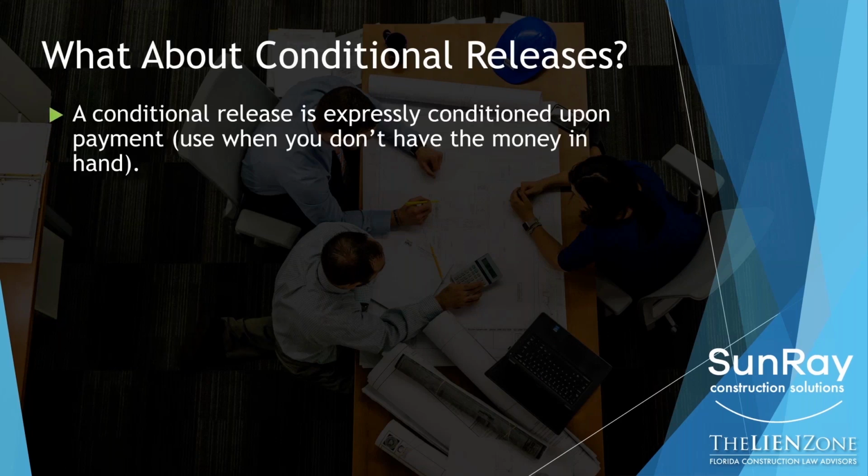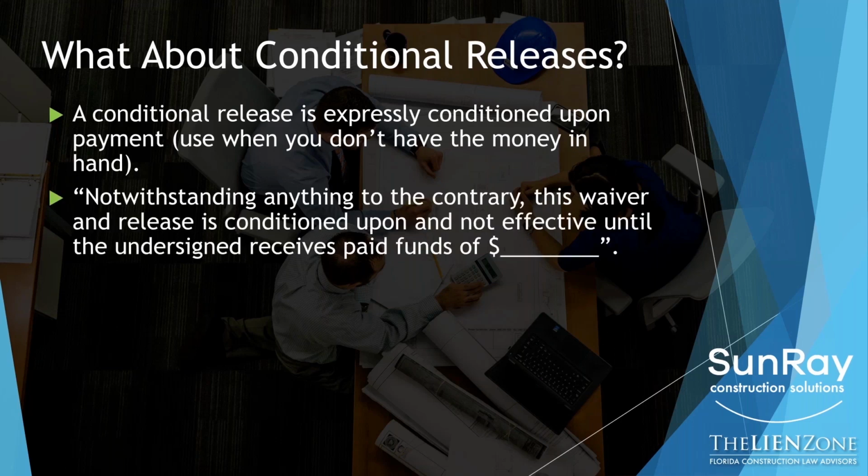So let's talk about conditional releases, because this is a question that comes up on a very regular basis. A conditional release is any release that is conditioned on actually receiving the money that you're expecting. So let's take a look at a sample language that you can include in any release. You can handwrite it. You can type it in. It doesn't matter as long as it's in there.